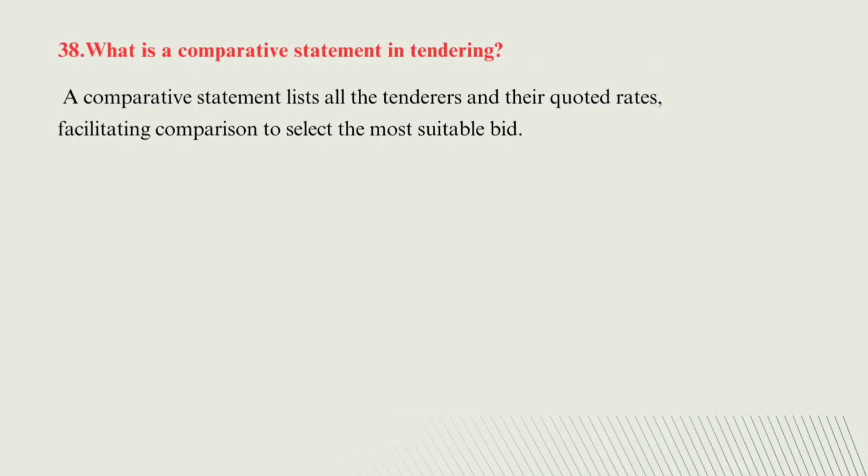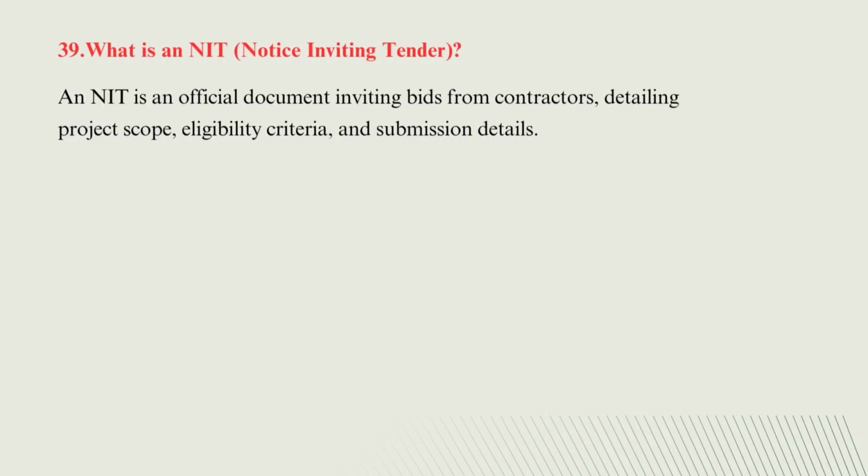A comparative statement lists all the tenders and their quoted rates, facilitating comparison to select the most suitable bid. The next is, what is an NIT, notice inviting tenders? An NIT is an official document inviting bids from the contractors detailing project scope, eligibility criteria, and submission details.